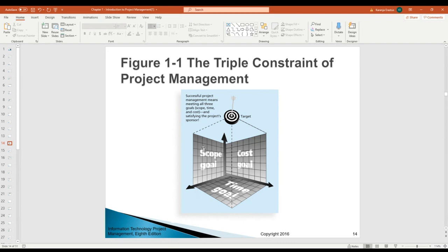There is what you'll hear being called scope creep. Scope creep is whereby people start adding things. So you're building a house and it's supposed to be 6-story, and then somewhere somebody comes and says, let's make it 7-story. Okay, that's what is called scope creep, and that is going to add to the budget, and it's going to add what?